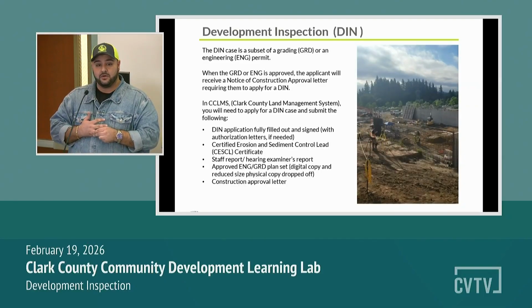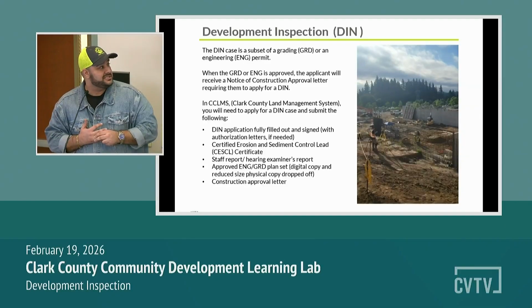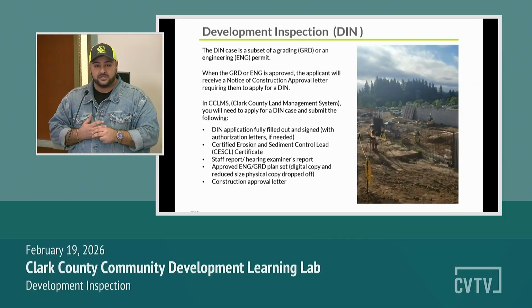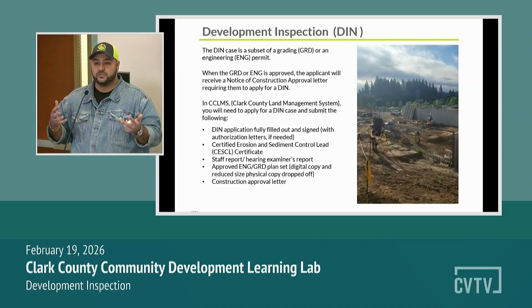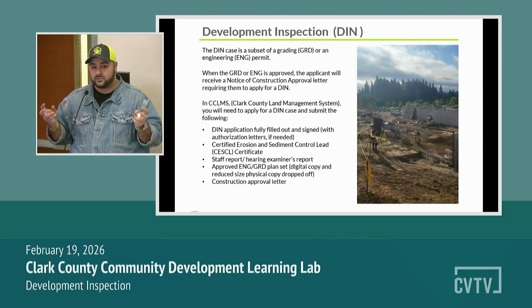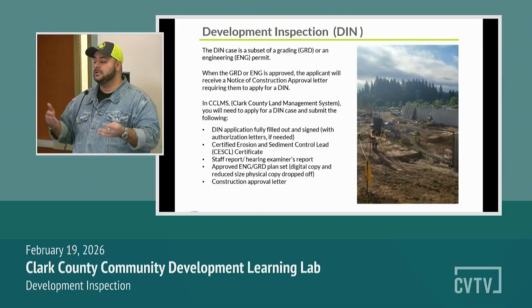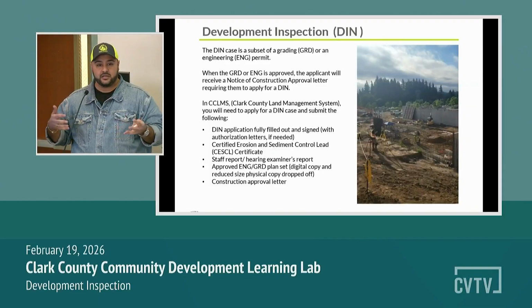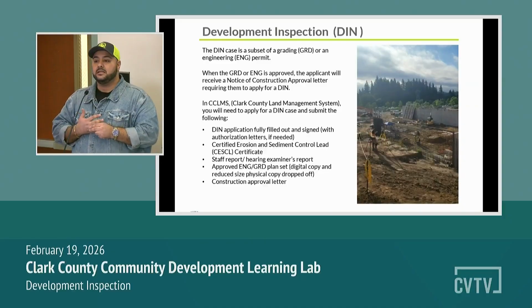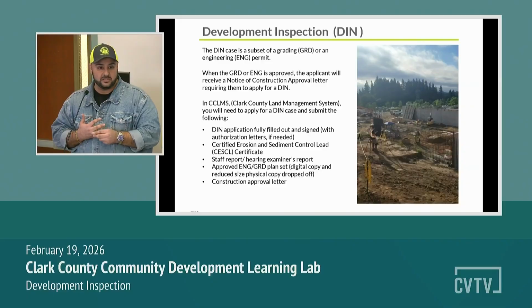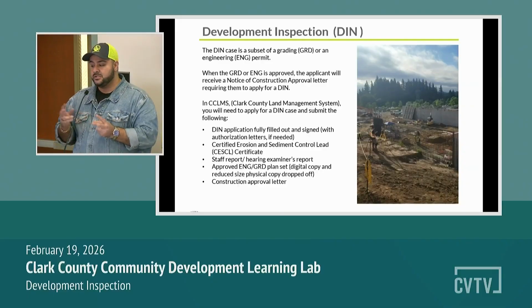and then you're going to have to submit the following items to us. So as you can see here, the DIN application, we will need that to be fully filled out with authorization letters if needed. The reason I say authorization letters is sometimes there are certain owners that own the land, and then they hire the developer or an engineer or an applicant, as we refer to them, to submit on their behalf and be able to obviously give authorization to do the work. So if we don't see, after we check and thoroughly vet the project, that the owner is listed, we need an authorization letter from the owner signifying that you have the power to do so, and then of course submit on the owner's behalf. So that is the applicant.